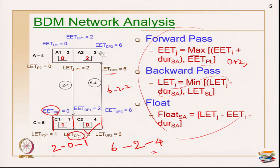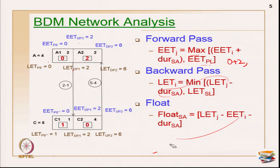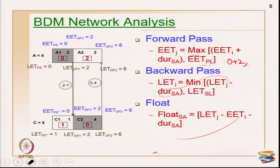So far we have seen forward pass, backward pass, and also the float calculations — we have finished the entire network analysis. As per the analysis, this particular sub-activity has 0 float, this one has a float of 2, this one has 0 float, and this one has a float of 1. The critical path here is A1 with the link and C2, because they have 0 floats on this particular network. That is how you complete the analysis. We have seen only one type of linkage — N1 to N2 — and using the three formulas for forward pass, backward pass, and float, we can also show the individual segments where the path is critical.